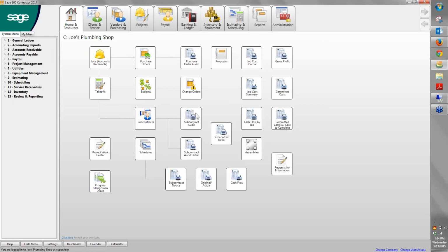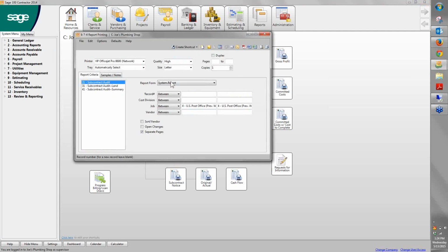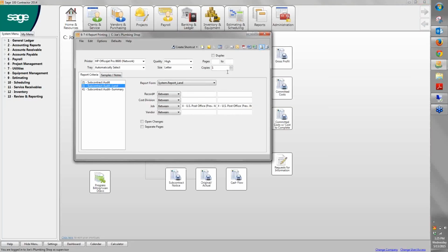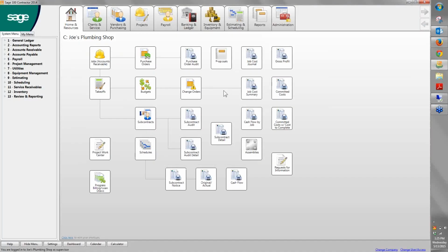A lot of subcontractors still subcontract out some of the work, and so a lot of that's due to they may have a part, maybe they're a low voltage specialty contractor and they're hiring a master electrician to be part of the job. So the subcontract module automatically comes with it, allows us to track the draws, the change orders, the different schedule and values, and different pieces associated with that. So it allows us to track that within the subcontract side.